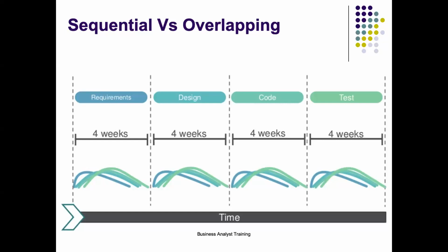So at the end of 4 weeks, you are not just building requirements, you are building a small portion of the whole project, and that could be shown to a customer, used, and reviewed, right? Versus in a sequential project, you just have a pile of documentation, a requirement document. You don't have anything substantial. In the case of Scrum, you have working software after 4 weeks.